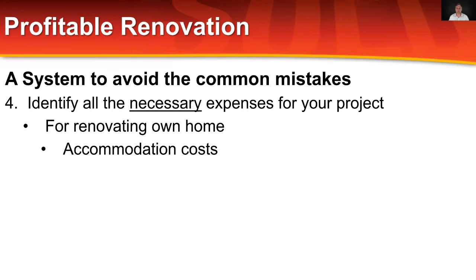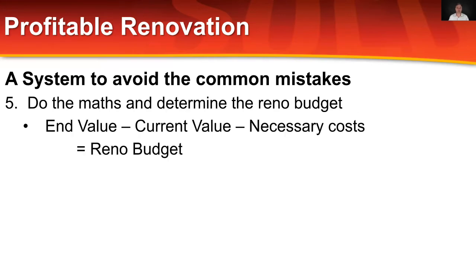Okay, from that, we then get to the mathematics of it, which is, what is the end value? What will this thing be worth once I've renovated? Then I take away from that what the current value is, because we've already figured that out.